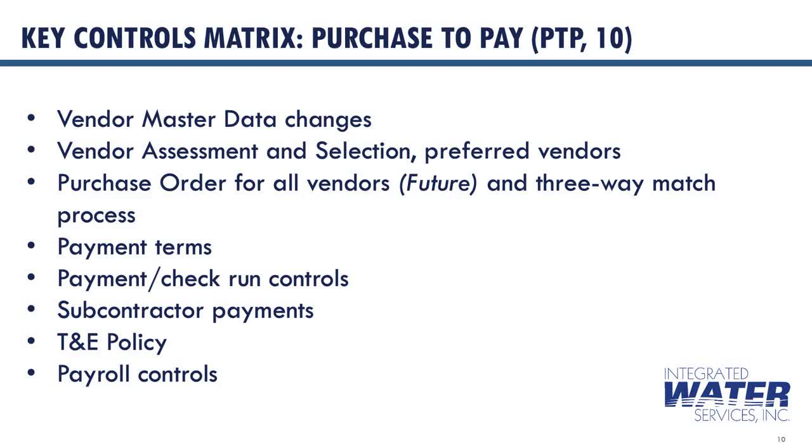The accounting team will have payment run controls to determine which invoices meet the specific criteria for payment. This step ensures that only eligible invoices are considered for the payment process. We do not pay any subcontractor before we have been paid by the customer, and if there is an exception, it has been approved at the proper level as per the delegation of authority.